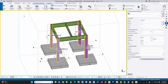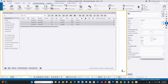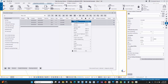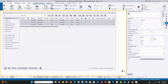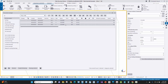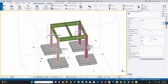The way I do this is I go in the Document Manager, use a very specific field consistently across the detailing job — and even across jobs if possible — sticking with Title 3. I set that specific submittal number, tell the fabricator exactly where it's at, and they can use the filtering at the top to filter by that, select the parts in the model associated with those filtered drawings, and easily make the exports they need. If you don't do something like this on a partial submittal — especially on a large complicated job — it becomes very difficult for the fabricator to find and select the specific parts. Using the drawing list is the easiest and most consistent way, and it's easy for the fabricator to verify against the drawing submittal.